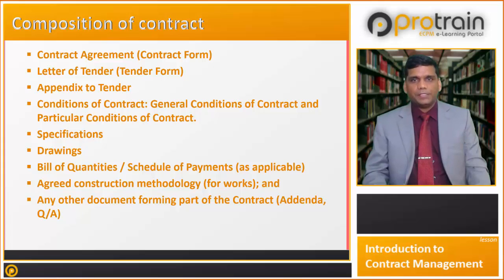Specifications provide information about the scope of works, and general and technical requirements of the contract. They also provide information about material standards, details of the samples to be provided, and tests to be carried out. The method of executing the works is also included in the specifications. Provisions of access or space for other contractors are also part of the specifications.